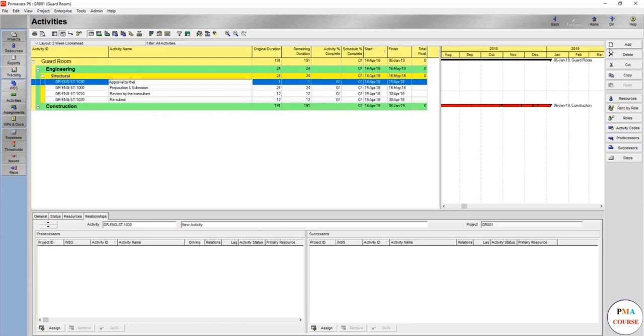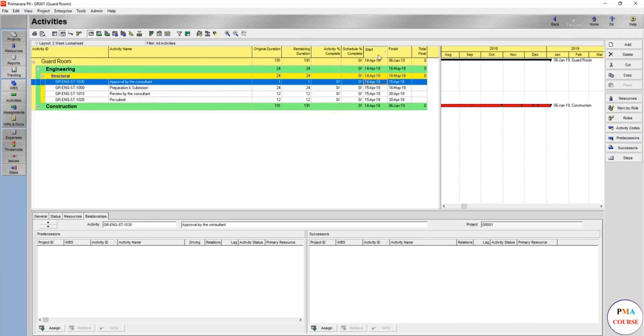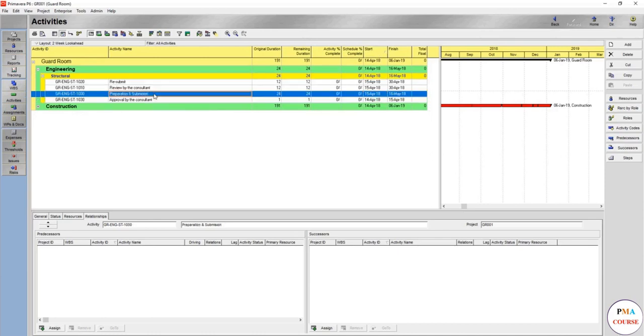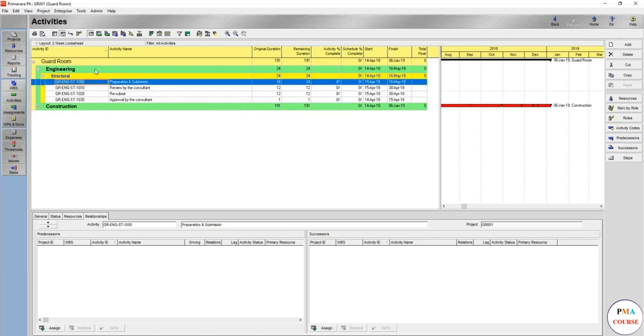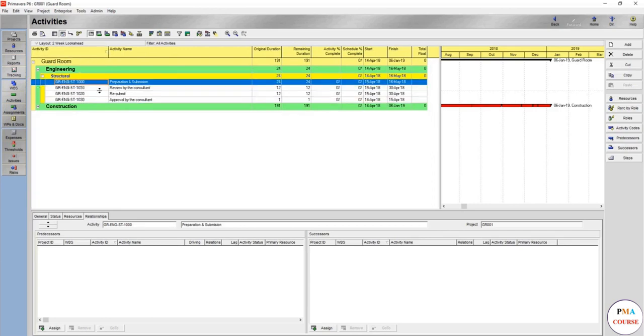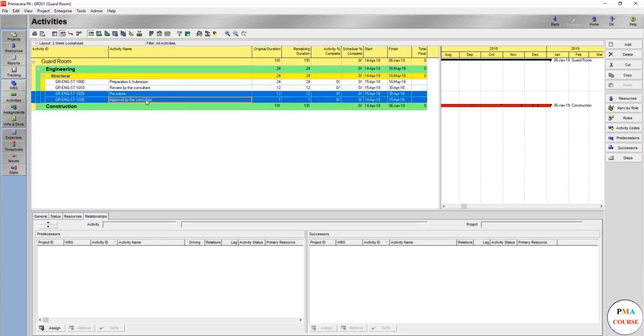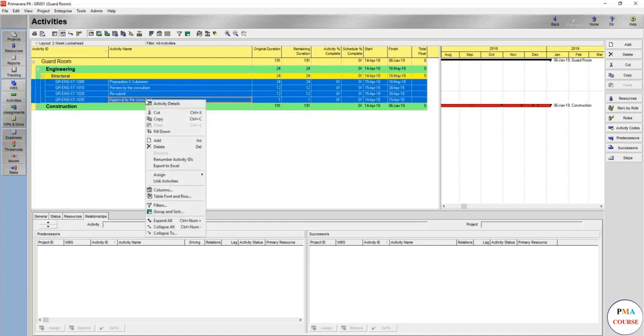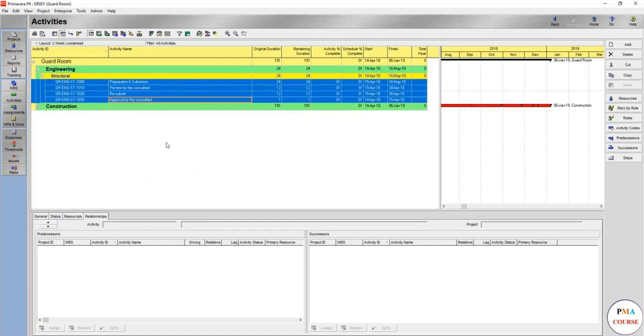That's great, now it's finished. In order to make this start - it's a little bit hazy here - we can press by activity ID to sort. Whenever you press you are going to sort. So we are going to sort by the activity ID and we are going to link all finish-to-start. Press once and link activities, and done.